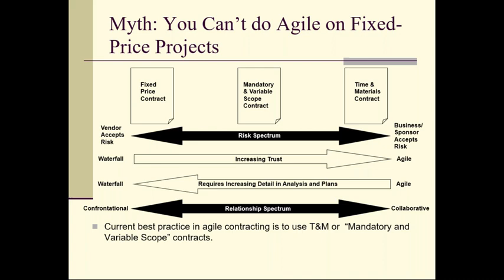So we're going to go through the project. You're going to be signed after the mandatory phase. We start the variable phase. You sign a work order at the beginning of each 1 month period of time. Tell me which items specifically you want me to work on out of the list of available items. You want new items, come up with them. I'll just put them on the list and tell you how many points it is.